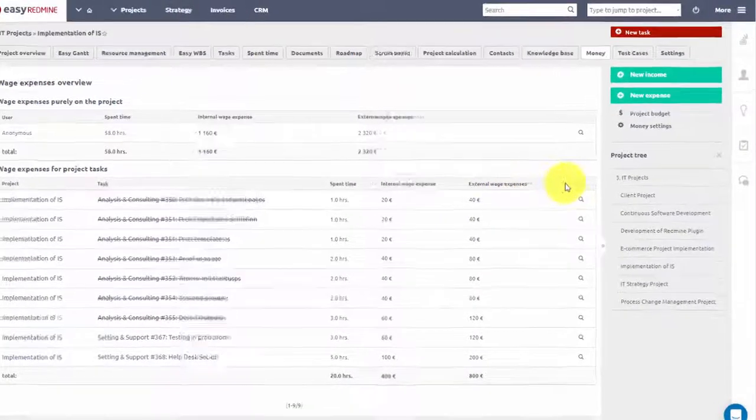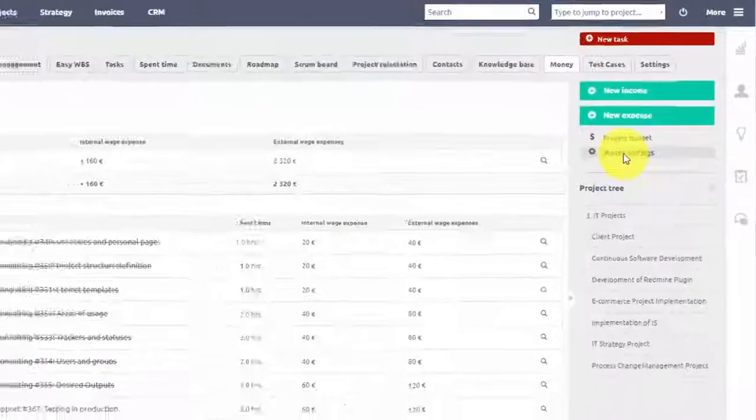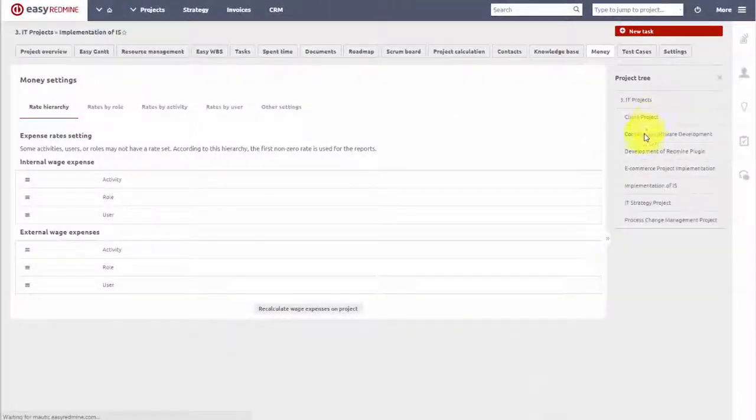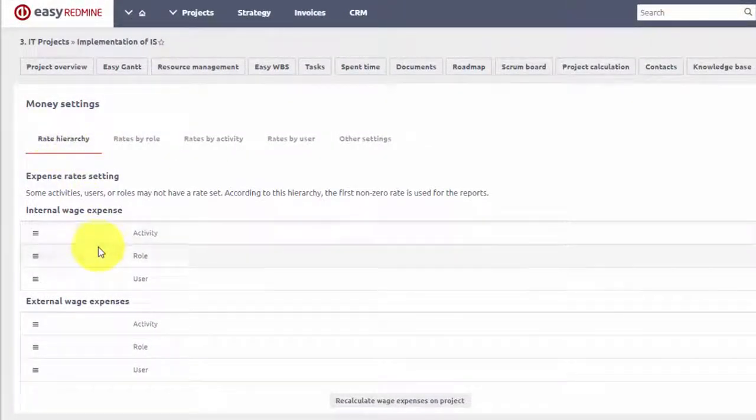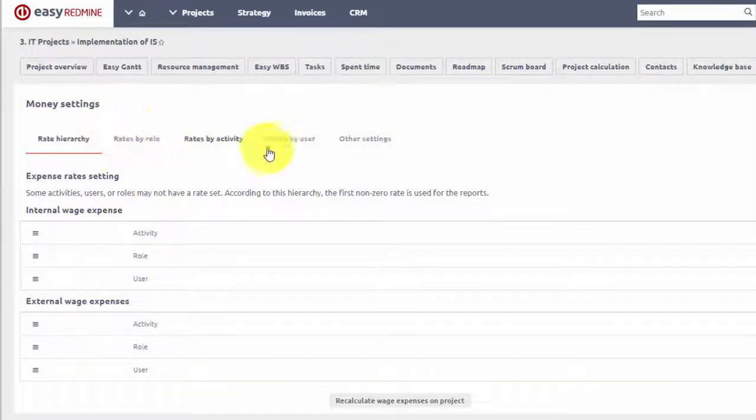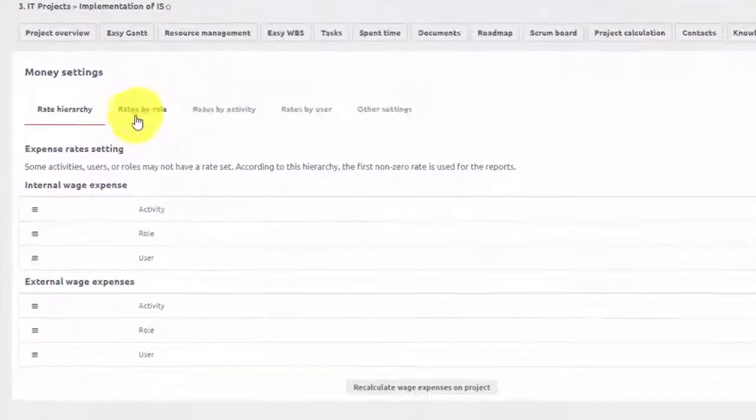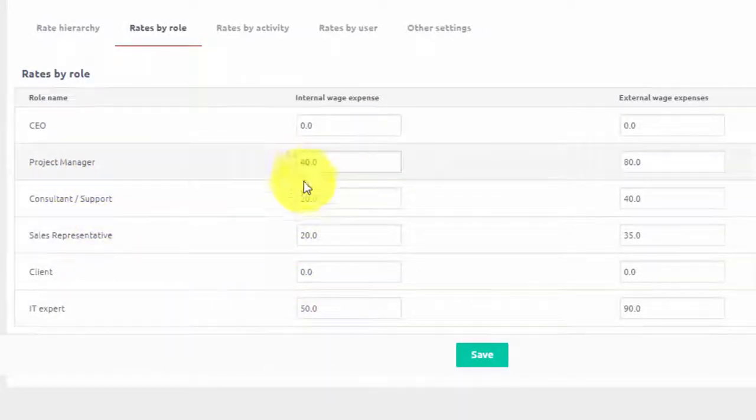Hourly rates can be easily adjusted in budget settings. Here you can see rate hierarchy and in these three tabs you can define rates by role, type of activity and user for both external and internal wage expenses.